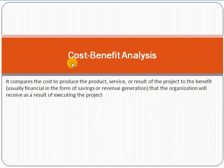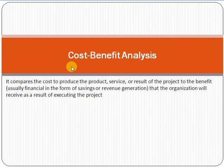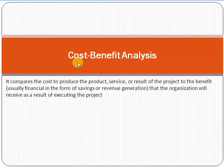For example, if a mobile application costs $5,000 to build but the benefits amount to only $4,000, then cost is high and benefits are low — so we should not go for that project. Cost-benefit analysis tells you to calculate all costs and all benefits, then compare them. If benefits are more than cost, you can consider proceeding. If benefits are lower than cost, it is not a feasible option.